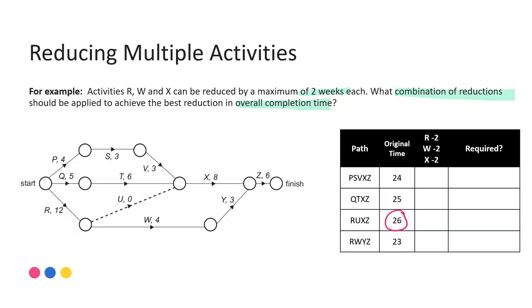The next thing I do is I am going to apply all of the reductions that I've been told I can. So in this particular example I was told R, W and X could all be reduced by two weeks. So anywhere where any of those activities occur I can take two weeks off the overall current completion time. So in my first pathway I definitely have an X. That means I can take two off that current original completion time of 24, so it'll come down to 22. The second pathway again I have an X but no R, no W, so again I can take just two off bringing it down to 23.